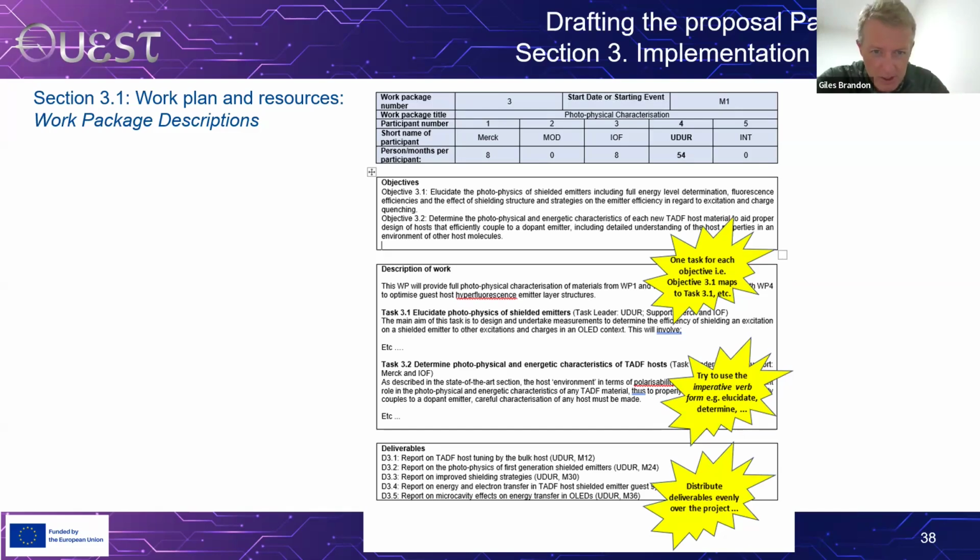map to it what the objective is. And in fact, if you strip it down to the basics, the title for your objective can basically be the title for the task. In a sense, I say to myself, well, why wouldn't it be? You're saying to yourself, you've got this objective and you've got to do it. Well, you better get on with it. You get on with the task. So anyway, I have this simplistic approach. Each objective maps to its own task.